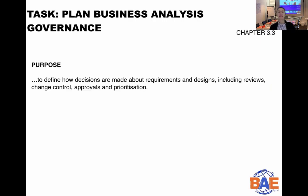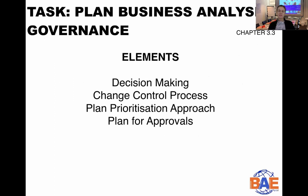The purpose of planned business analysis governance is to define how decisions are made about requirements and designs. It includes reviews, change control, approvals, and prioritization. The four elements to run through are: decision making, change control process, planned prioritization approach, and plan for approvals. This particular task is crucial for business analysis work to be executed successfully throughout the life of the project.